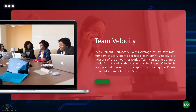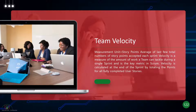There are some important metrics we use in scrum. One of them is team velocity — a very important metric. It basically shows how many story points a team is able to finish in one sprint, and that tells you how many story points the team should commit in the sprint planning meeting. The team should not be over-committing or under-committing.